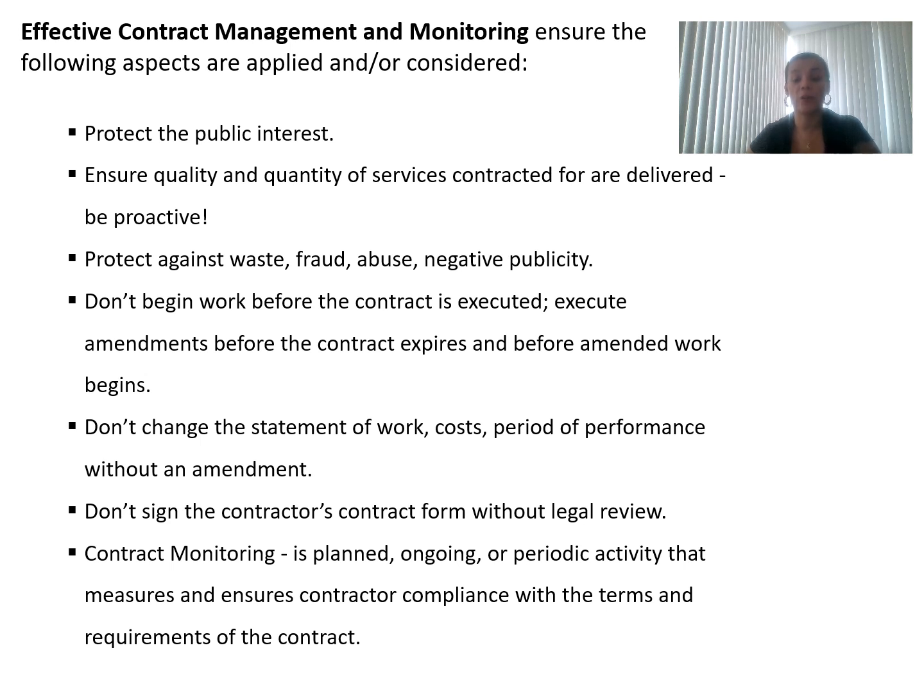Don't change the statement of work, cost, periods, or performance without an amendment. Following a best practice of the Project Management Institute, any change goes through a contract change management process, which is a very formal process that assures an amendment is stated, and the contract should also state how this process should be issued. Don't sign the contractor's contract formally without a legal review. This is also important: don't do the contract without a lawyer.